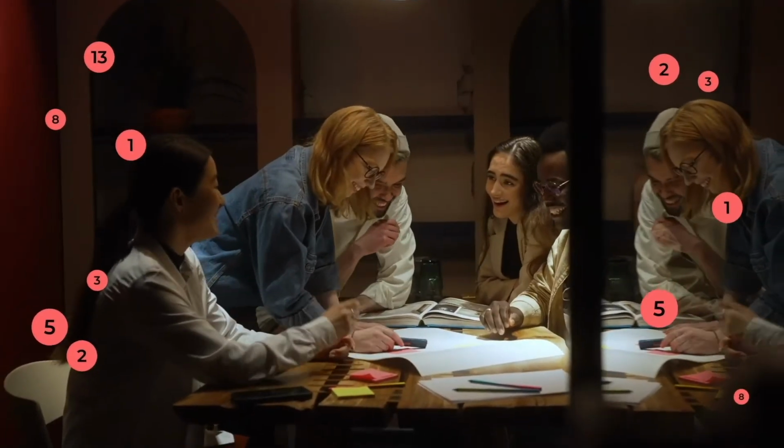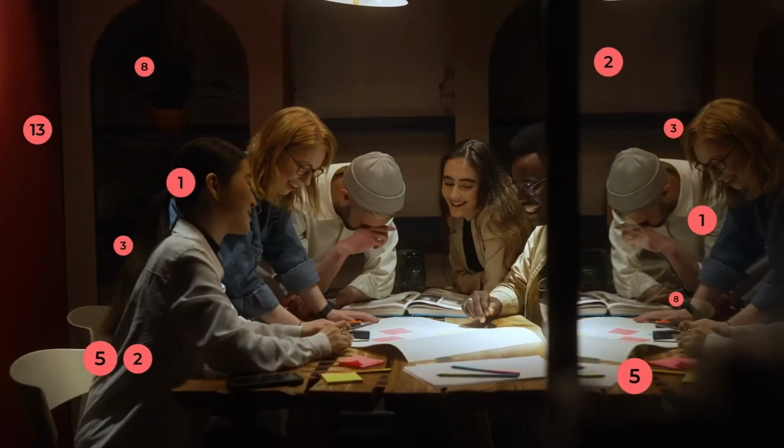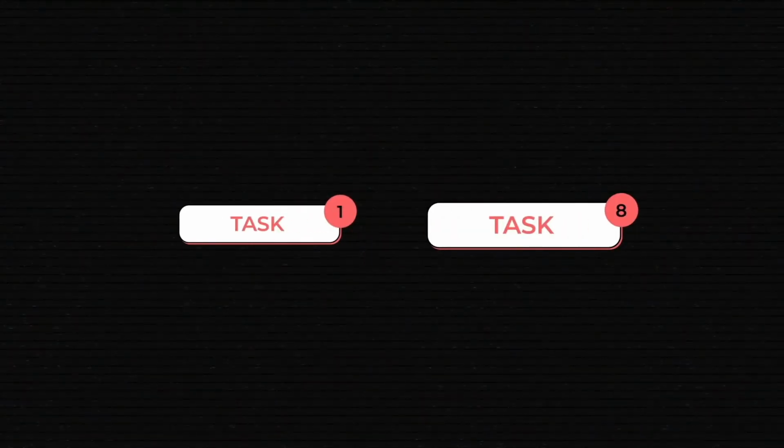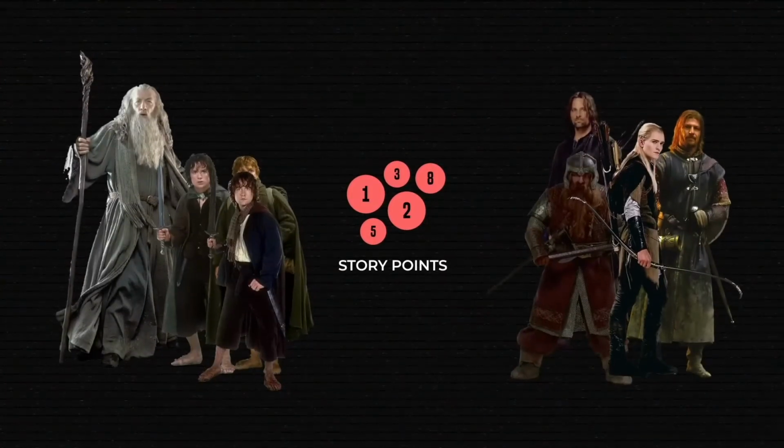Story points have been in use in Agile teams for over 15 years, and they're a bit more complicated than rough day estimates. This method involves assigning tasks a certain value relative to their complexity. For instance, 1 is a simple task, while 8 is much more complex. Of course, complexity is subjective, which is why story points assignment is often a team effort.